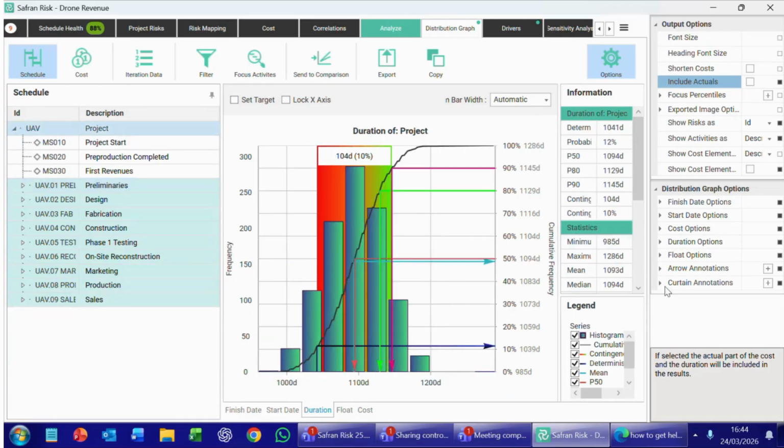So once you go into execution and you want to choose between the total duration versus the remaining duration, you've now got that little checkbox up there, which, if I had any progress, would help demonstrate this. It's something that crops up quite a lot, and some clients wanted one, some wanted the other, so now you can choose exactly which one you prefer to see.